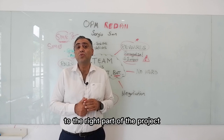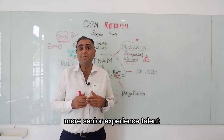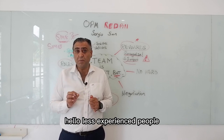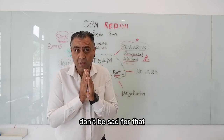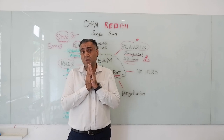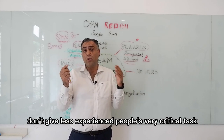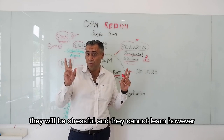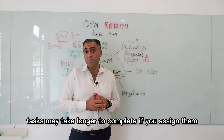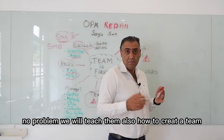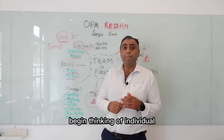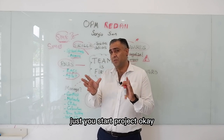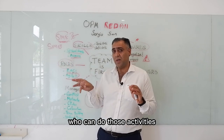Start by aligning the right skills to the right part of the project. More senior, experienced talent will help you do more work in less time. Allow less experienced and junior people to work on low-risk tasks — this will help those people grow and learn. Don't give less experienced people very critical tasks; they will be stressed and cannot learn. Tasks may take longer to complete, but no problem — we will teach them. Begin thinking about individuals in your organization who could get those jobs done, and consider which activities each person can handle.